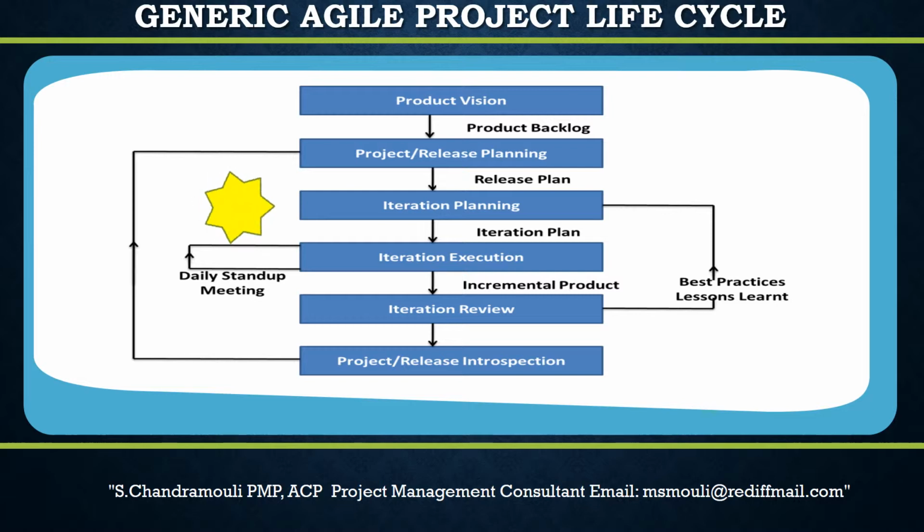Iteration plan consists of iteration backlog, assumptions, risks, actions, dependencies, and communication. Team will determine what features can be accommodated in the current iterative cycle, sprint. It also orders priorities, the features of the current immediate iterative cycle. Features are decomposed into tasks, minute level. Now the team can determine the capacity of the team, and the tasks on hand in the current iterative cycle, sprint.